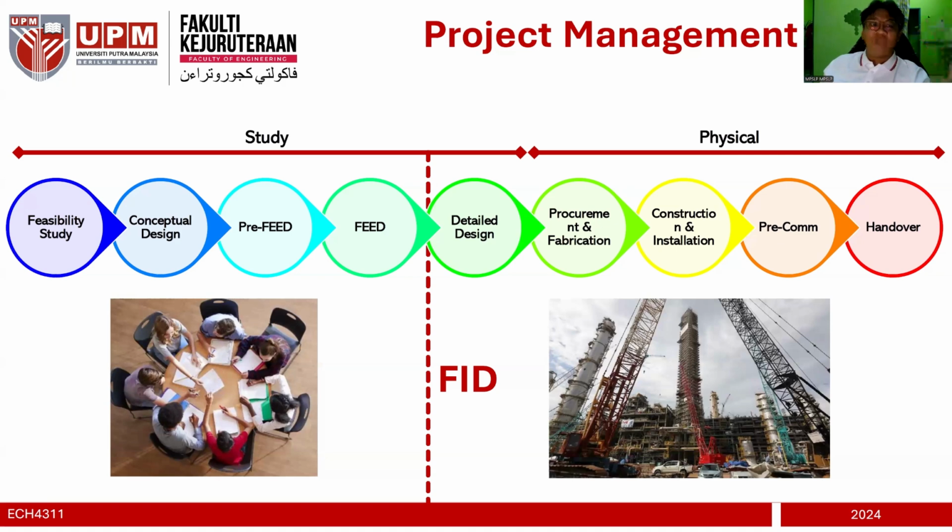For conceptual design, most of it is around 20 to 30% of the cost estimate, and the most likely deliverable is a basic drawing for you to communicate your concept, and then maybe helps to refine it further.